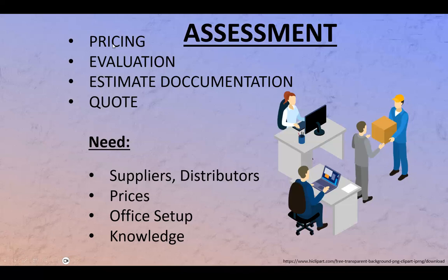You have to tally them up, add the prices, and then calculate a bunch of things: profit and markup on the equipment. You need to calculate how much time it's going to take per person, how many person-hours it's going to take to do the job.